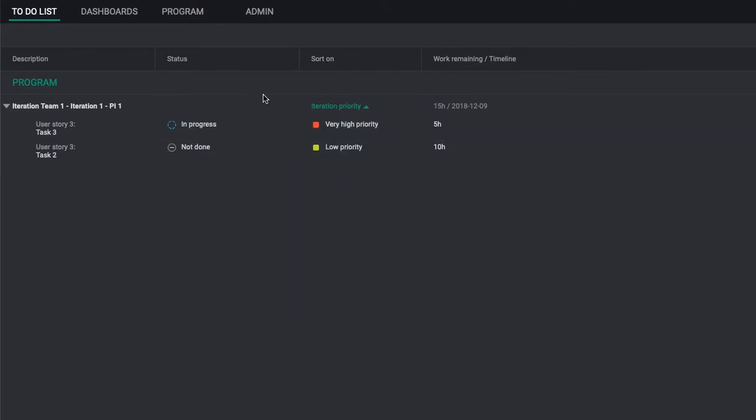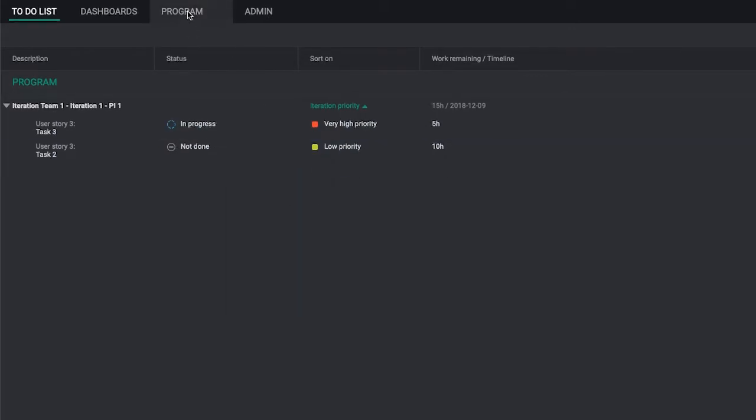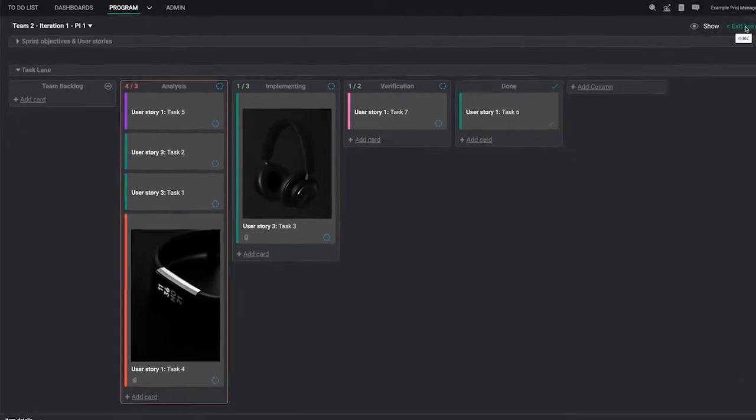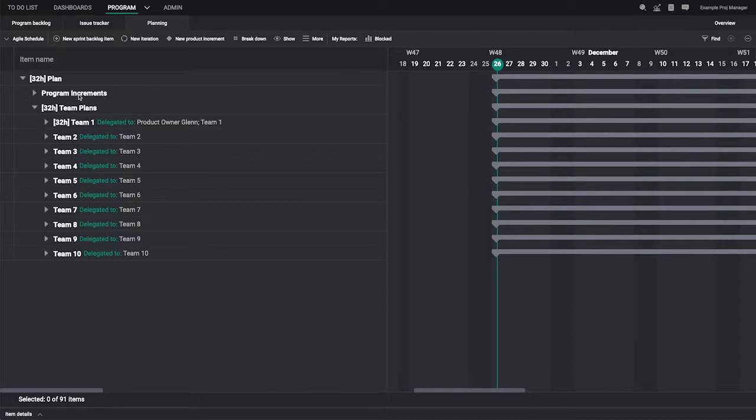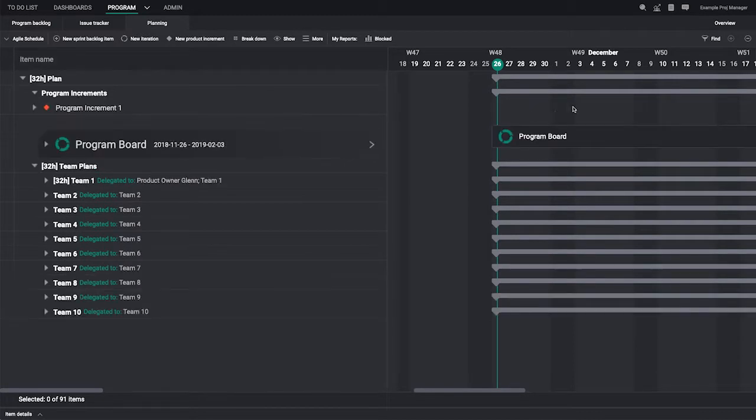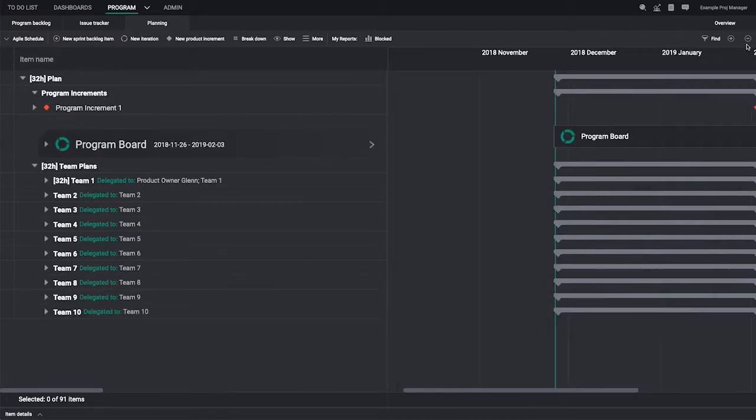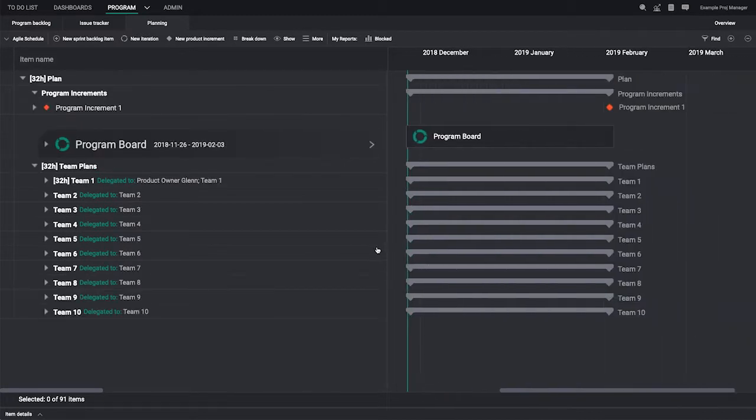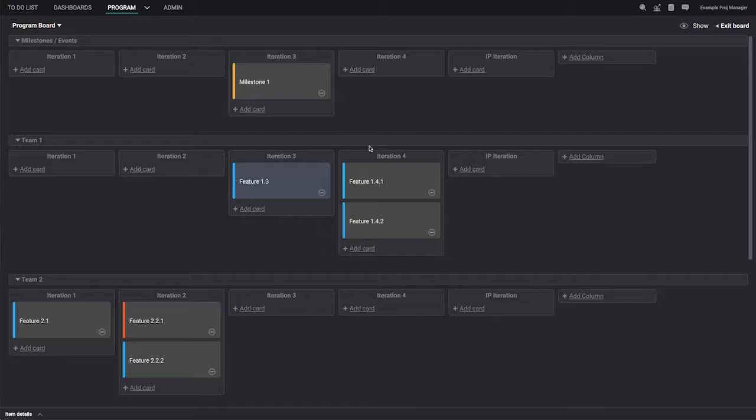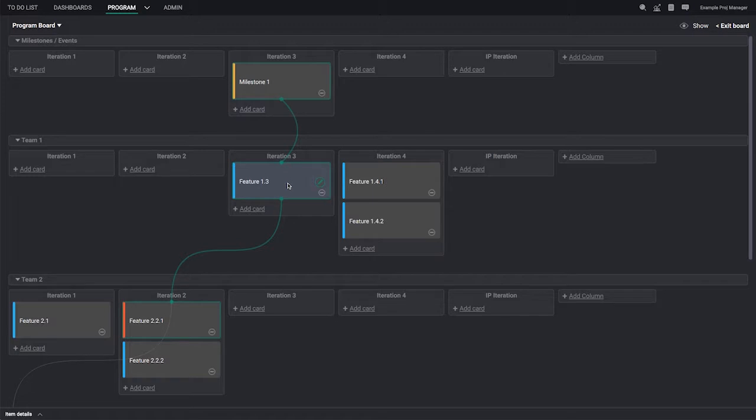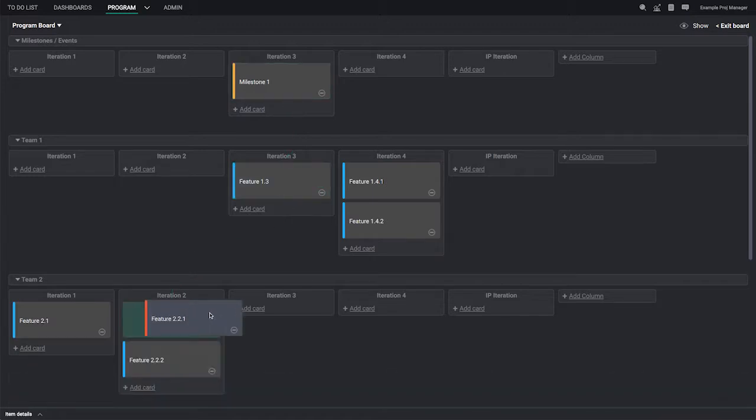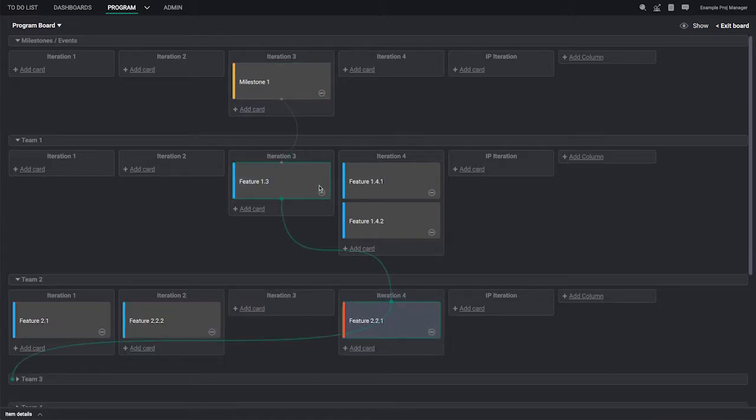At the program level, SAFe teams align through two primary artifacts: program increments and program backlogs. Program increments are common milestones tracked on the timeline. A joint program board built in HanSoft simplifies program increment planning and collaboration. Whether for features or enablers, decision makers can see team dependencies, add risks, and make assessments before beginning the next increment.